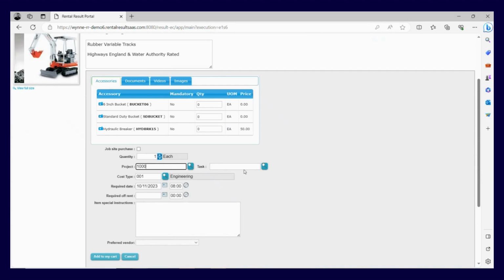We can track projects and task codes, WBS codes, phase codes. The subcode structures are named very differently across the world, so naming conventions in the system get a little difficult. But again, those labels can be changed. So we track project numbers. You can see I haven't added a project number. When I logged into this, it recognized who I was and what project I'm on. And if I'm only working on that one project, it's going to automatically populate it for me. If I'm working across multiple projects, it will allow me to make a selection, and you can see that from the little magnifying glass there.